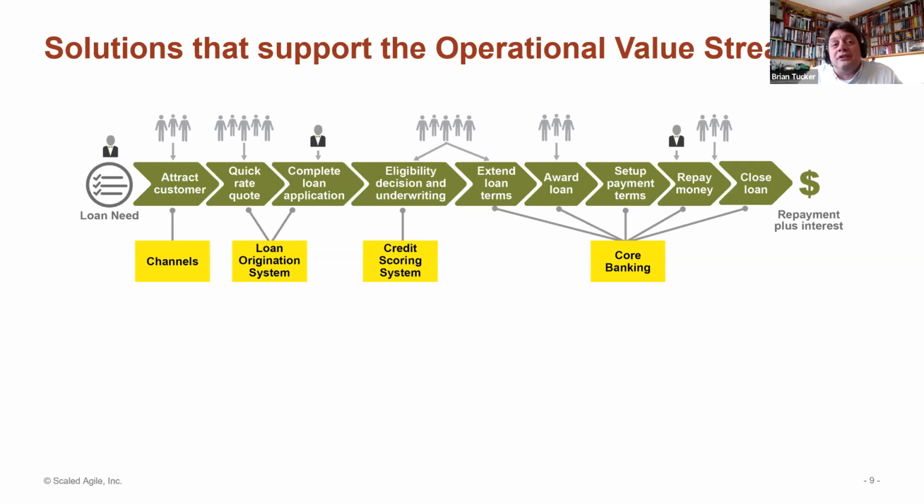What I'm interested in is knowing if any of these systems are tightly coupled. Can't release A without releasing B at the same time. Perfect lockstep. It might make sense to keep these two systems within the same development value stream so that release coordination is easier. Long term, tight coupling is bad. You'll want to re-architect. But this might be a compromise we make to get going so that we can use the lean agile processes to help with the re-architecting into the desired future state.